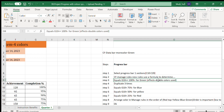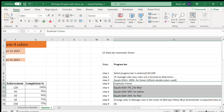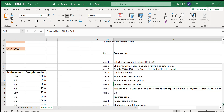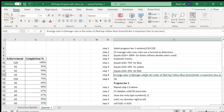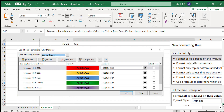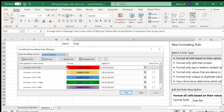That color will be changed to green. We then duplicate that three times for four different colors: less than 75% is blue, less than 50% is yellow/orange, and the other is red. We arrange the colors so that red is on top — the arrangement is very important — and red is set for less than 25%.